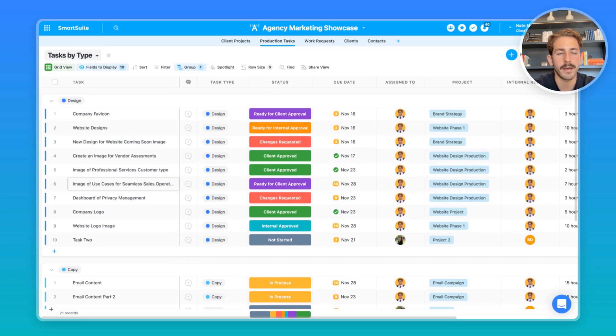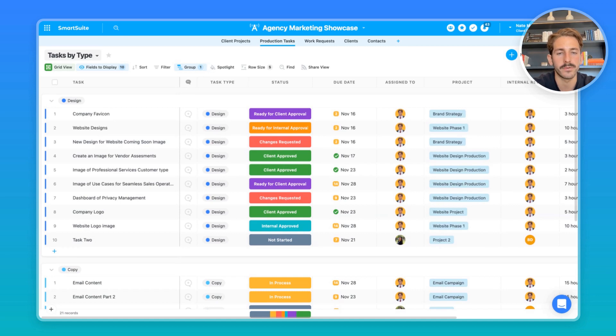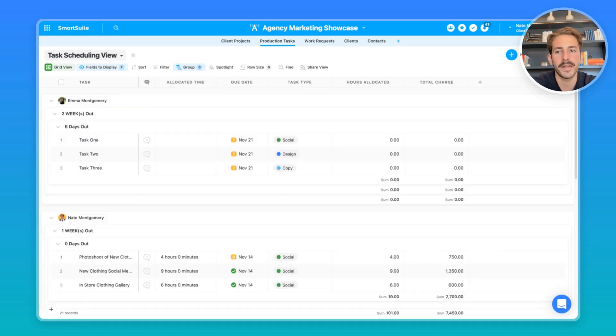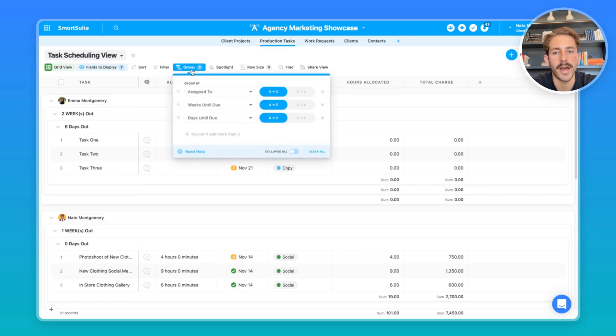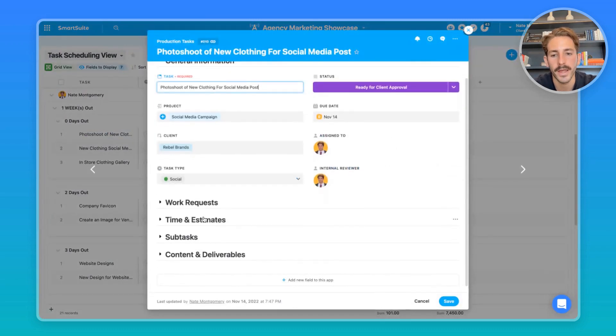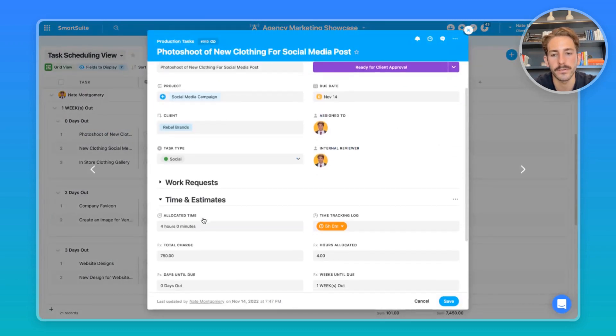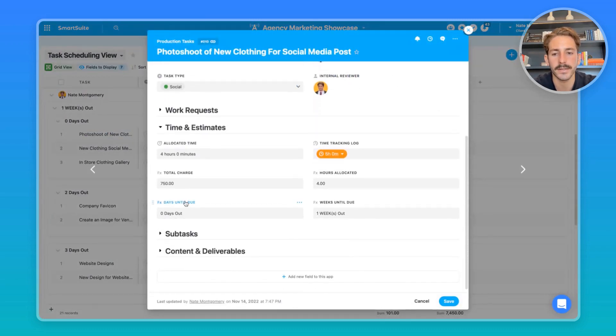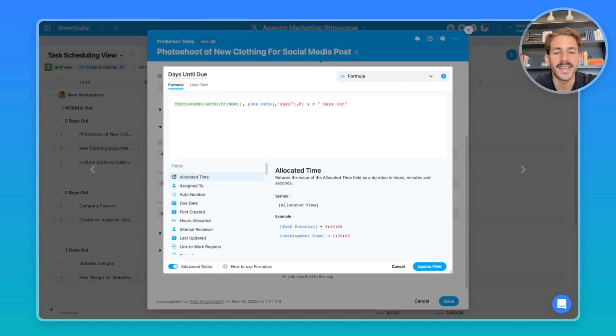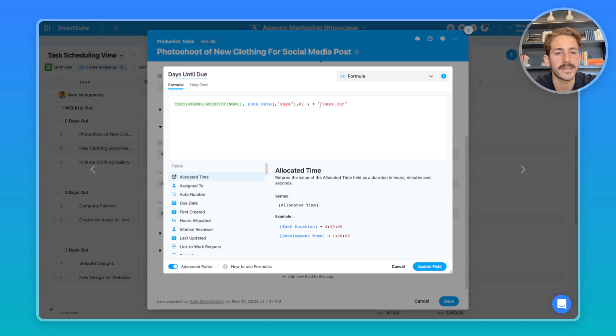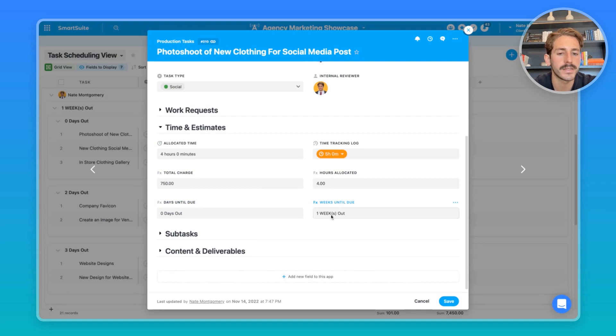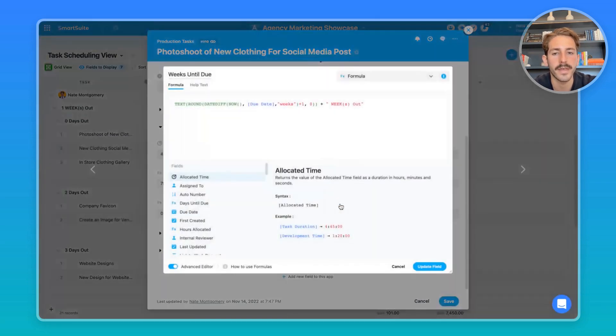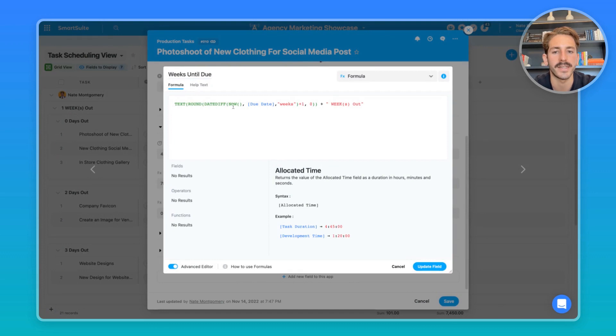Now we have a result where projects are recurring on a weekly or monthly basis based on our frequency, and they're creating a set of templated tasks based on the type of project that they are. And if you're a manager, you probably want to schedule time to allocate the work to your team. I've created a task scheduling view for just that, and we're grouping by assigned to and then a couple formula fields which I'll explain. If you open up a record and go down to time and estimates, we can see we have the days until due and weeks until due. The days until due is taking the number of days from now compared to the due date. It's adding this to the days out text once we convert that number to a text, and as a result we get things like one day out, two days out, etc. Inside of the weeks until due, we have the same thing, but instead of using days, we're using weeks inside of the date difference field.